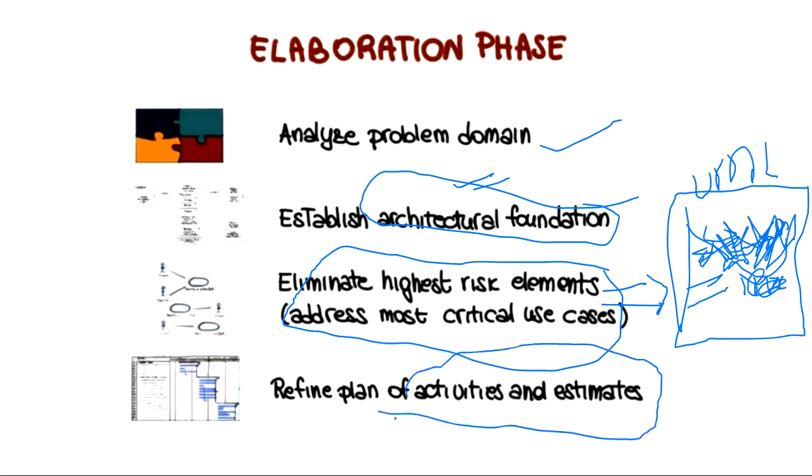In the design part, when you design your whole system, you will see that initially in the inception phase we thought the project would take 50,000, but now the cost is exceeding by 10,000. So you have to refine all the plans. You also have to inform the user that, okay sir, you gave us a 50,000 budget, but while designing the plan we found out that it is exceeding by 10,000. So again, that is why it is cyclic.